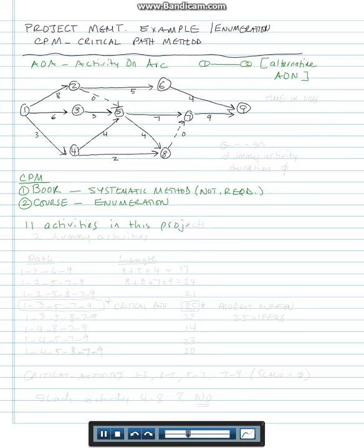There are two activities that are dashed. A dashed activity like this between two nodes is considered a dummy activity. A dummy activity is an activity that is used just so we can have a better representation of other activities in the network, so that arcs don't cross each other, basically. It has a duration of 0. So two activities are dummy, but we still use them when we are listing our paths.